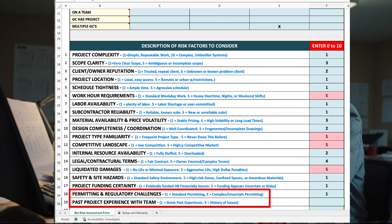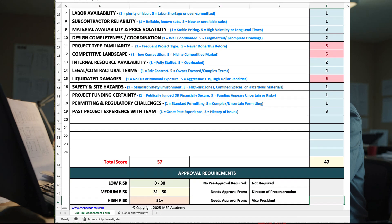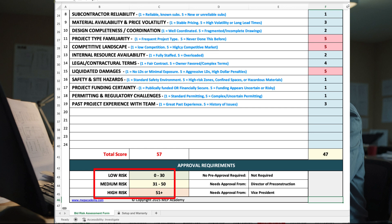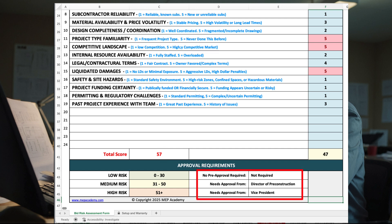After scoring all risk factors, the total points will be automatically totaled into three ranges that you can easily change to fit your particular risk tolerance: 0–30 points is low risk — strong candidate, pursue the bid; 31–50 points is medium risk — proceed with caution; 51+ points is high risk — think hard before committing time or money. Based on the risk assessment score, there could be different levels of managers or executives required to sign off on the project. This ensures that management agrees with pursuing higher-risk projects. The higher the risk factor, the greater the need for upper management approval to pursue.